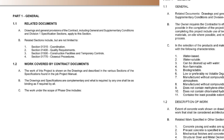Also, at 1.2A, 'Work covered by contract documents,' referring to the construction drawings: 'The work of this project is shown on the drawings and described in various sections of the specifications found in the project manual. The drawings and specifications are complementary, and what is required by one shall be binding as if required by all.' So you can see by these few statements, you better be familiar with the entire set of specifications, because by contract, you will be held responsible.